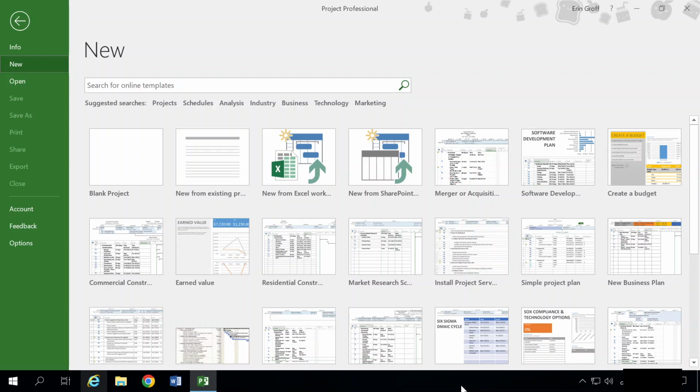Because the project plan is in an early development phase, you decide to enter the information you have so far into the project plan file and to add additional tasks when the team has determined what they will be. You also want to create a recurring task that shows a project status meeting occurring on alternate Tuesdays until November 10th, the approximate date you think the project will be complete. We're going to start by opening up our data file.